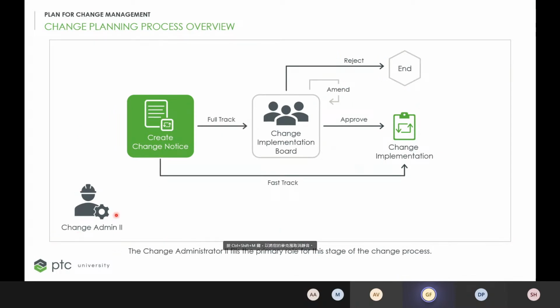The admin too. He will create the inventory of parts and documents that must be modified to implement the change request. He will delegate activities to other resources, and he remains responsible for the whole plan.